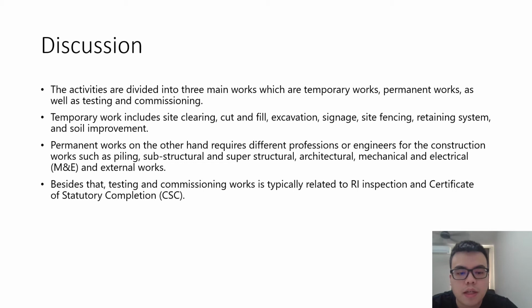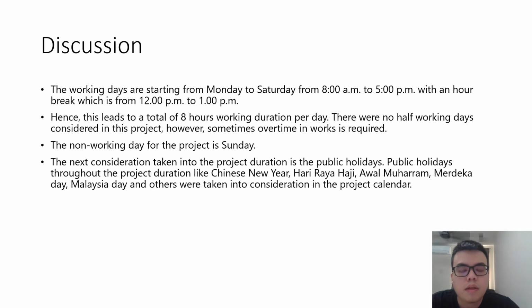Besides that, testing and commissioning work is typically related to RI inspection and the certificate of statutory completion, also known as CSC. The working days are from Monday to Saturday from 8 a.m. to 5 p.m. with an hour break from 12 p.m. to 1 p.m. Hence, this leads to a total of 8 hours duration per day, and no half working days were considered in this project. However, sometimes overtime work is required. The non-working day for the project is Sunday, and the next consideration taken into the project is the public holiday.